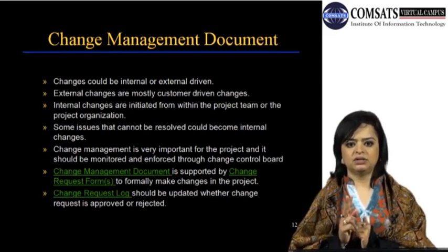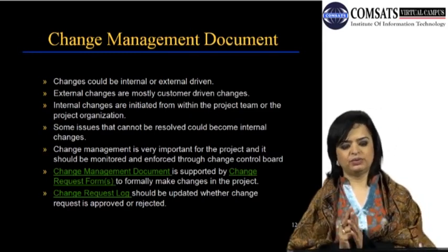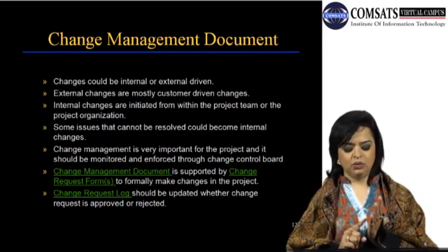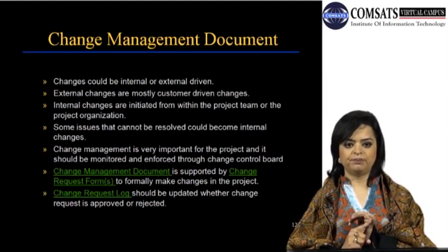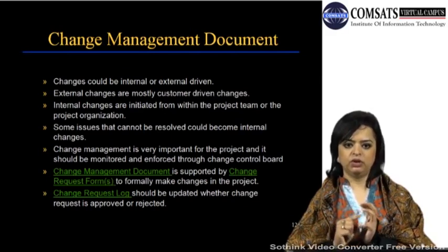So two documents: one is the change management process document, and then the two subsequent documents. One is a change request log. Any changes, whether approved or rejected, any small minor change or a major change, should be documented in the change request log.